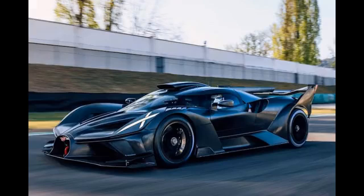Experience with similar engine models and desired performance goals. Contract writing. LJRC negotiates a fixed-price contract with the chosen vendor, outlining the following: specific engine components to be upgraded. Guaranteed minimum horsepower increase of 20%, resulting in a minimum of 5,400 horsepower. Completion deadline aligned with the racing season schedule, for example, 2 weeks before the next major event. Warranty clause covering any defects in materials or workmanship for a set period, for example, 1 year.